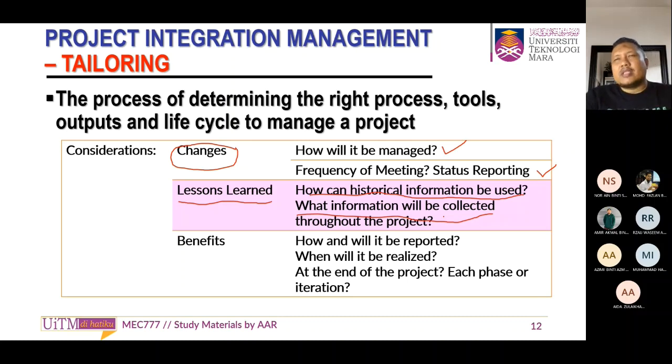I use the room data sheets to check what was promised by the contractor before the project ran, and what happened on the site currently. So I use that as the document that I referred to many times. That is a lesson learned from my first project.